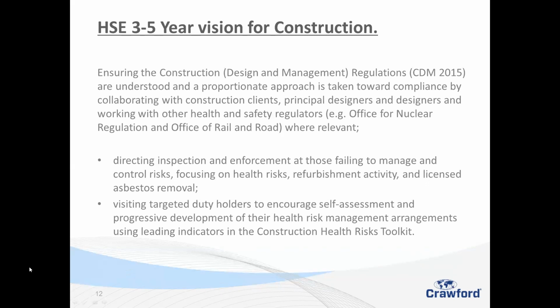What we need to know is where services are, and if they know anything that we need to know about where things were before we came onto site. We've had things in the past where they filled in a swimming pool and it wasn't done properly, and is it safe to put a 5-ton excavator over the top of it? And then we've had problems with Japanese knotweed, and nobody told us that the next door neighbour had problems with it. We went onto site and found out there was an extreme problem.